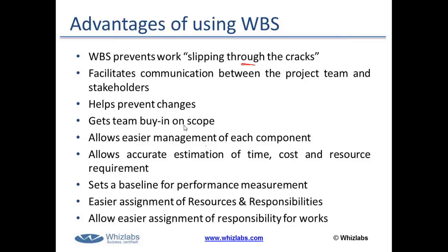Okay. Then it facilitates communication between the project team and the stakeholders. How? Let's say your senior management asks you, how much work have we completed? Instead of giving a generic answer that we have completed 10% of the work or 20% of the work, we can simply say that these are the work packages which are complete, these are the work packages which are pending. So WBS can work as a communication tool.